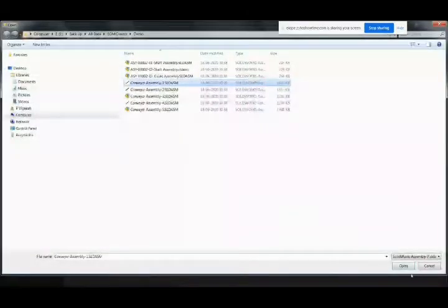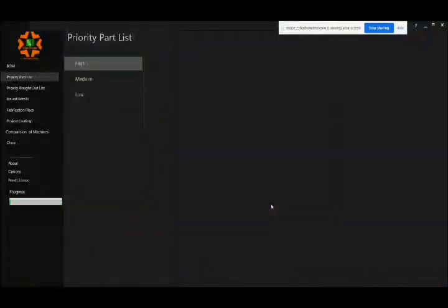So you can just quickly click and create a list of what my high priority items are. We can categorize these based on the lead time, and pass it on to the production and ask them to do the manufacturing accordingly. This again saves a lot of time, and we take the items with longer lead time first, the items with average time later, and the items taking least time at the end.